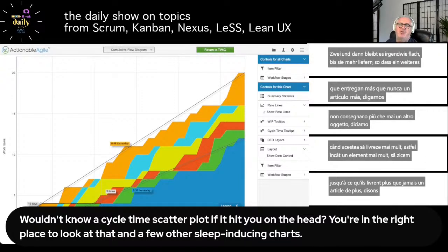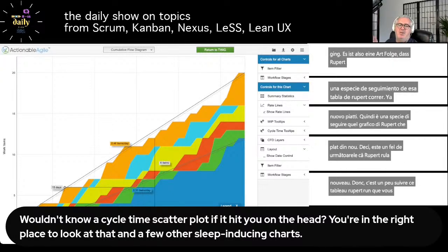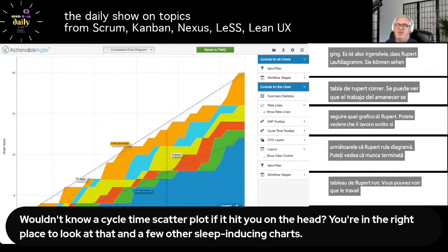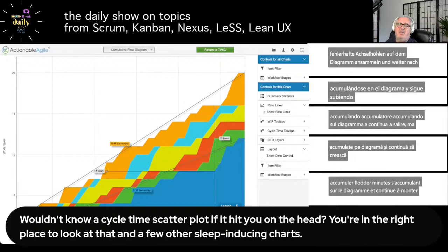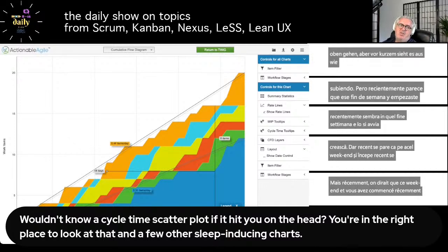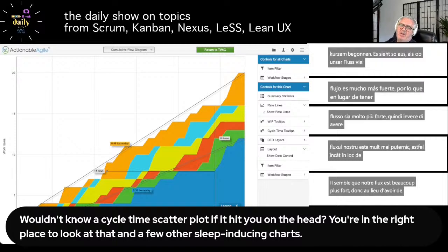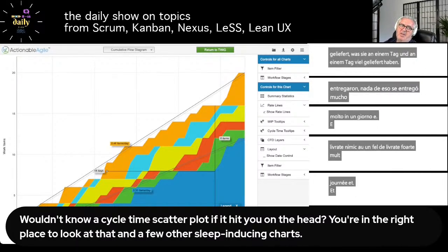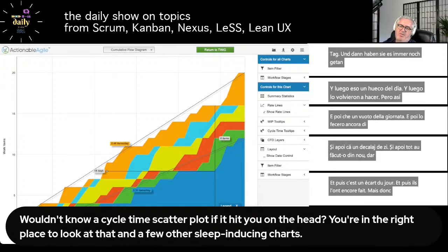So it's following the throughput run chart. You can see that the done work is accumulating, hence a cumulative flow diagram. It's accumulating on the diagram and it continues to go up. But recently, on the Twig game when you started, it looks like our flow is much stronger. Instead of having long gaps where they delivered nothing, they delivered a lot in one day, and then they had a gap of a day, and then they delivered a bit again. So a bit more delivery than before.